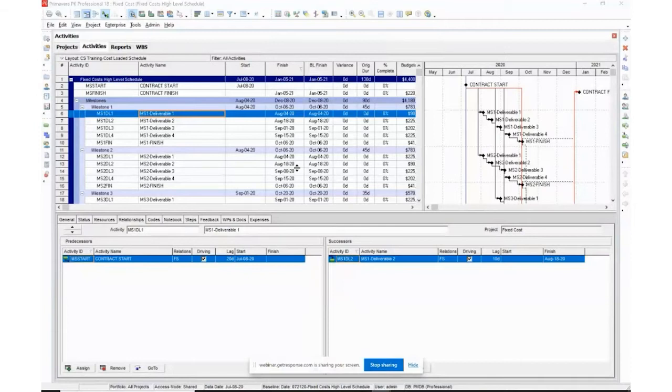However, if they are, it is important that they do not have the rates associated with them attached to their budget, or it will skew, or in other words, distort the budgeted cost totals because their values will be added to the total. So let's get started.